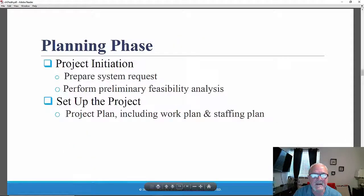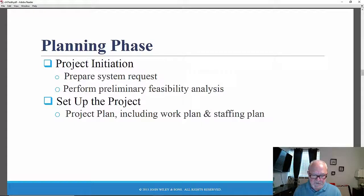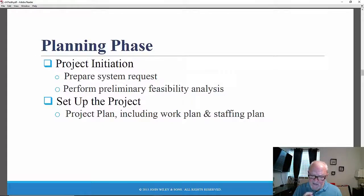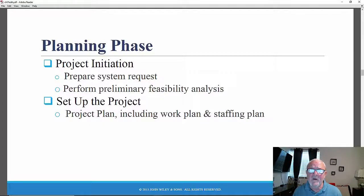Let's begin by discussing the planning phase. The planning phase is the first phase, and that's where the project is initiated. The key question is: how will the system contribute to the organization's future success? There may be a system request and a feasibility analysis that examines key aspects of the proposed project — technical feasibility (can we build it?) and economic feasibility (will the system, when implemented, actually provide some sort of return on investment or business value?).